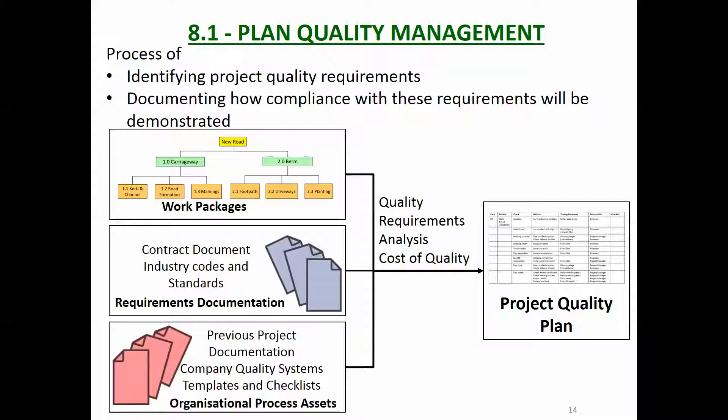Your company will have templates and checklists as part of the quality system, and it will also have its own quality systems processes — who does what, who does the inspection of the road, when do they do it. Most organizations will have quite a substantial amount of documentation telling you how to do quality management. You take all that information, assess the quality requirements, figure out the cost of quality and what inspections you need to do, and what you come out with is the project quality plan.